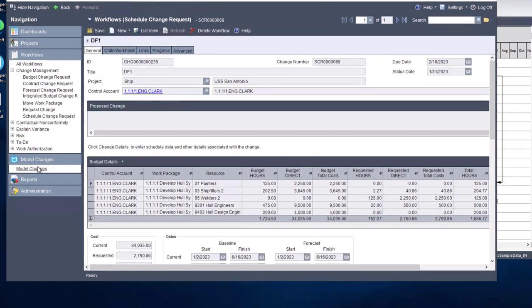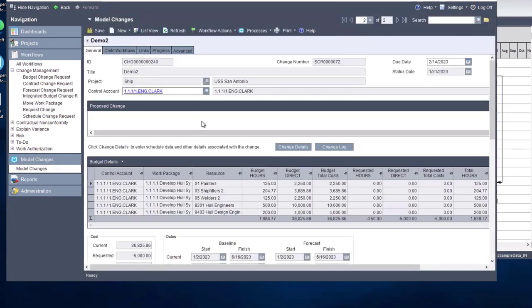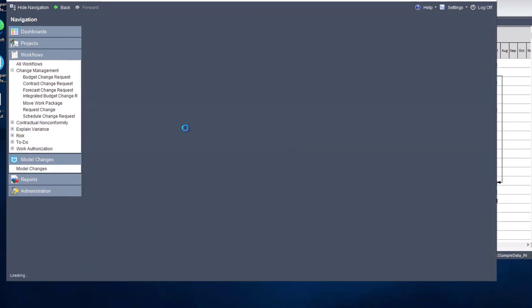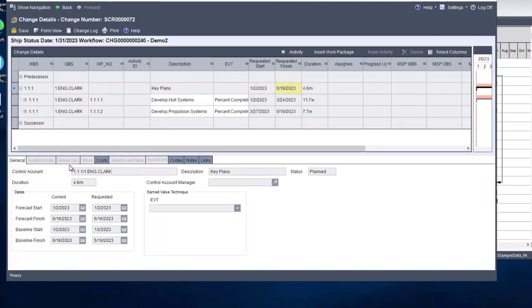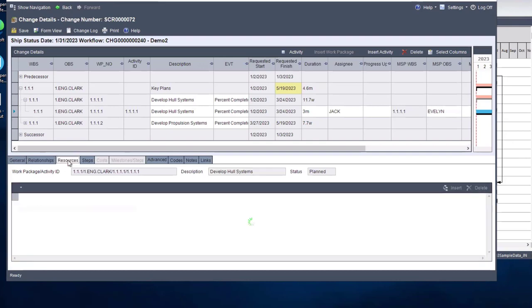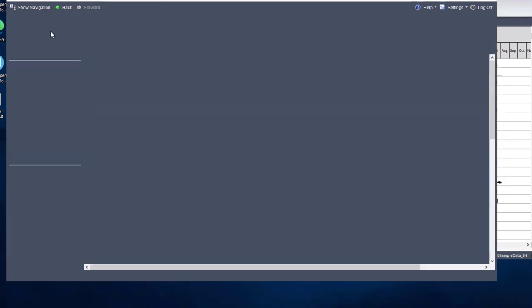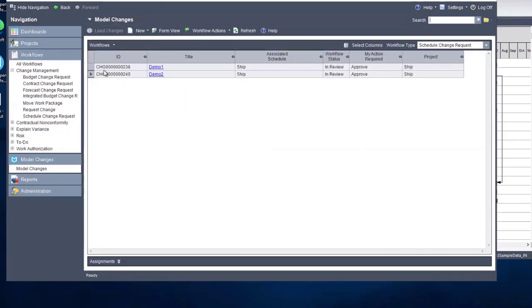if you are in change details and you add a resource assignment, if you just enter a total amount and say spread linear or spread bell, and you do not edit the time phase data, when that assignment gets added to Open Plan, it's a single row with that resource ID and the total amount, just exactly like it is when you do it in Open Plan. We don't start creating all these offsets and periods unless you go in and start editing the time phase periods in addition to editing the total, or instead of editing the total. Does that make sense?